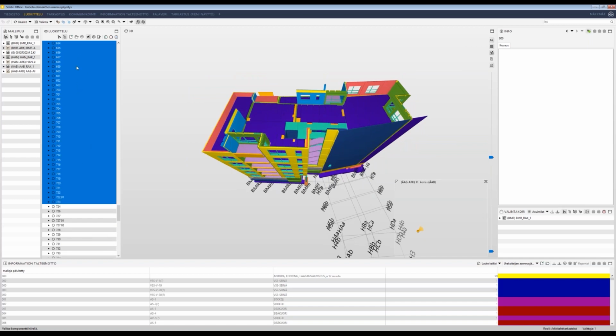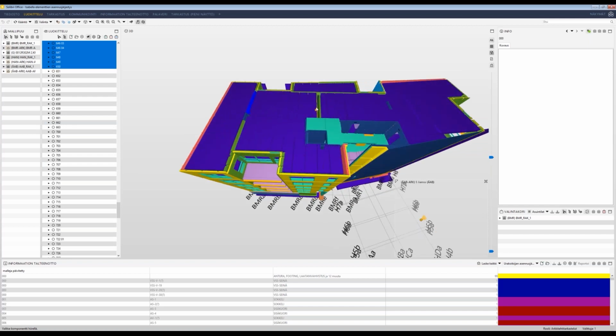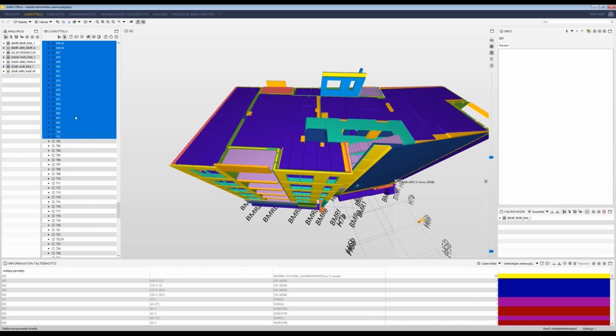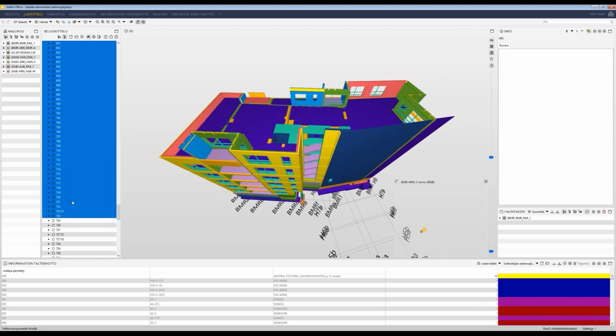So for example, on the 6th floor, we had some delta beams that were not on the lower floors, because some of the apartments are a little bit bigger in the upper floors. These kinds of variability were spotted in the workshops and were planned ahead of time. Each time something different happens, it's always good to be able to plan it beforehand.